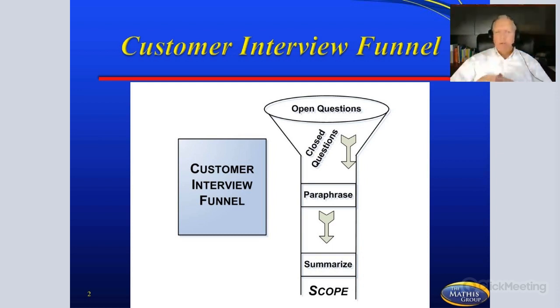One of the last questions I will ask the customer is, is there anything that would be good for me to know about this project that I haven't asked you? Or is there any requirement that we haven't talked about that will make a big difference with this project? That is a wide open question for the customer to tell you anything that they're wanting to tell you. And then at the very end is summarize.